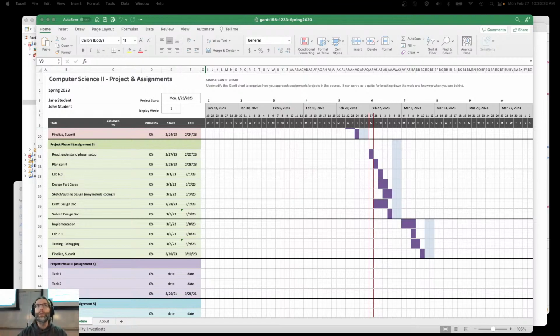We've already organized them into sprints for you, but in a real software development situation, your team would be self-organized, and you would identify these sprints. At the beginning of the sprint, you commit to a certain amount of work. At the end of the sprint, you look back and say, okay, did we meet our goals? If not, how do we adjust for next time? What went well? What didn't go so well? And I try to model that with all of our retrospectives.